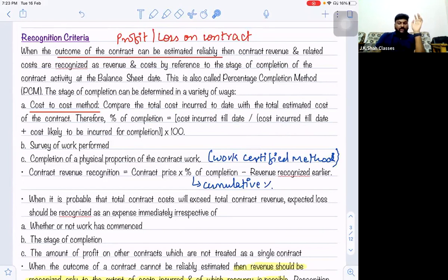Right? So on this basis, we are going to record the revenue, and the difference between the revenue and cost will be definitely a profit. See, when you say there is an overall profit on contract, every year certain proportion of that profit will be recorded. And after 3 or 4 years, your total profit will be more or equivalent to your estimated profit. It can be lesser or higher also depending upon the estimations if they change in future. But no losses can arise in between. Means you cannot say that in third year I am getting a loss. Not possible, sir. Not possible at all.